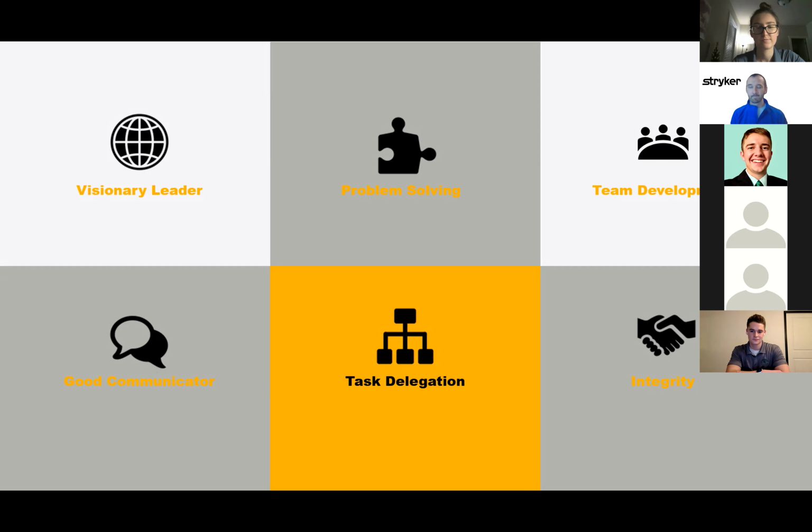So my product line now is about a $300 million product line. That equates to about $1 million a day in sales, which is a ton of money. So let's say that you skip something early and it causes a recall, right? You say, we're just going to forego this test. We don't need this, right? We want to save $10,000 and not do this test, because it saves us a week. And you launch a product, and that test could have helped you later identify the fault that could happen.